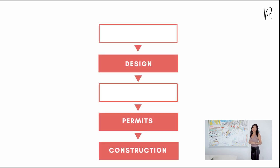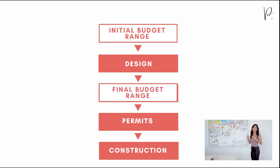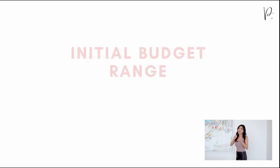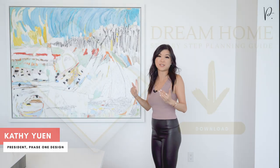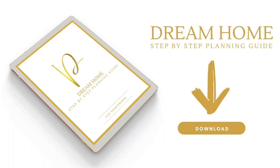Let's start with a graphic of the planning process. You'll notice that there are two different steps that talk about budget. First, you have an initial budget range that should be confirmed before you start your project. Then, a final budget range that can be confirmed once you have a design and a set of plans ready. In this video, we're going to be focusing on the initial budget range. We've created a step-by-step planning guide for custom homes — it's a free download linked in the description below.